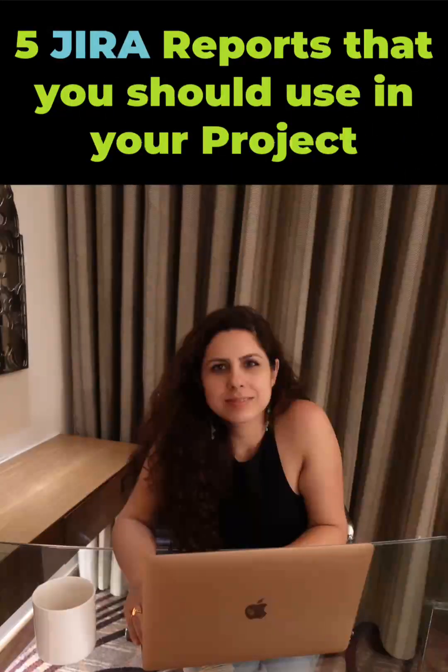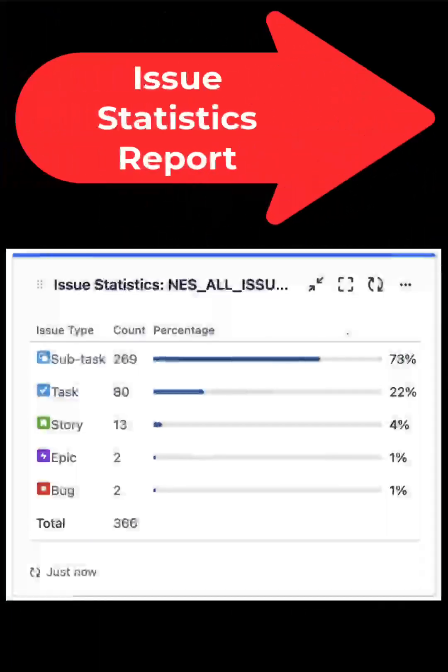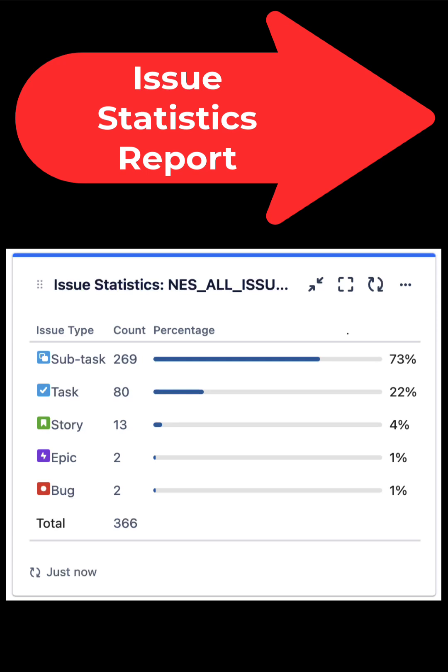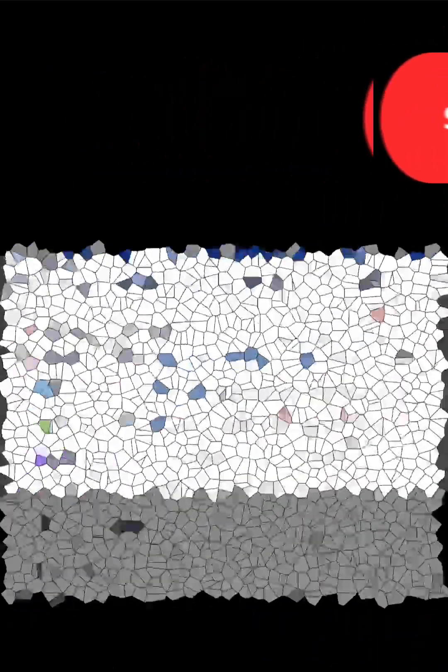The five reports that you should use to improve your project's health. Issue statistics report. This report is used to get an overview of project's issue statistics such as total number of issues, status distribution, issue types, assignee distribution, etc. Use this report to know the overall health of your project.